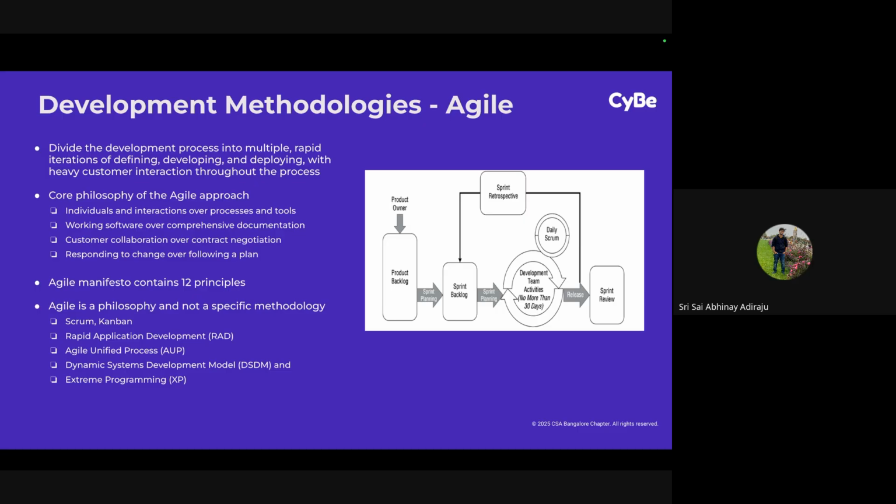Generally, companies adopt a 2 week sprint or a 3 week sprint. Within that sprint, you tend to incorporate some functionality to the software and ship it immediately to production, and then gain instant feedback on the shipped functionality, and then immediately incorporate the feedback. This way, the software development happens rapidly and also efficiently with good results because you're getting feedback and incorporating the feedback very frequently, as against the waterfall model where you cannot touch your software once the requirements, design, and development are frozen until you ship it, and then you have to revisit.